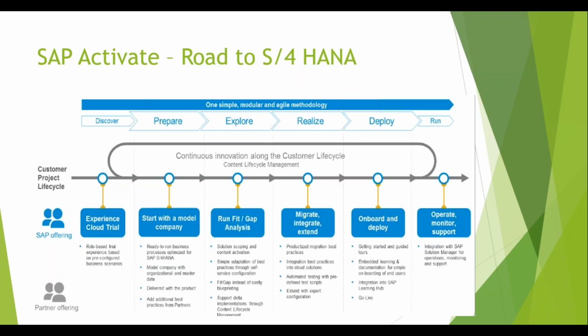So what is happening is, in the realization phase, if they ask you to make some changes, it will be a lot of rework. Instead, if these things were highlighted in the business blueprinting itself, it would have been easy to incorporate those changes. Okay, so where is the gap? The gap is in the way we perform the business blueprinting, because when we are performing the business blueprinting, everything is on paper, nothing is on the system.